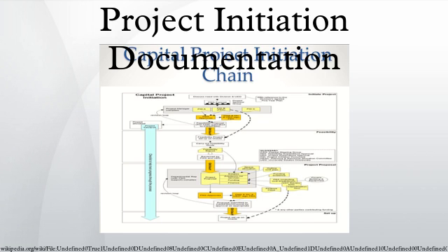Project controls. There are a specific number of sections which need to be completed in terms of controlling the whole project: project controls, project stages and exception process. Those could include budget actuals and forecasts produced for each financial period, exceptions to be escalated to the corporate program manager, product reviews from the quality plan, project tolerance, a risk mitigation plan identifying project risks and plans for their mitigation, an issues log, existing change control processes, weekly highlight report for the corporate program board, weekly supplier meetings, weekly project team meetings, etc.